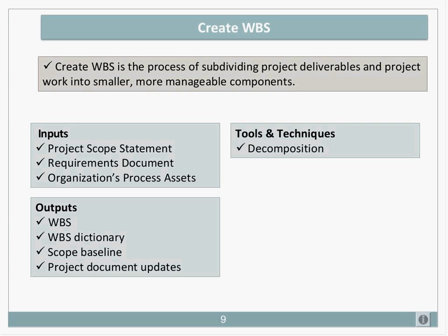The scope baseline is entered into the project management plan, and the baseline consists of the WBS, the WBS dictionary, and the updated product scope statement. One thing that we must remember about the WBS is that it is one of the verification tools to get the team all to have an understanding of exactly what the work is and what is required of each and every one. Any questions on the development of your WBS and WBS dictionary?